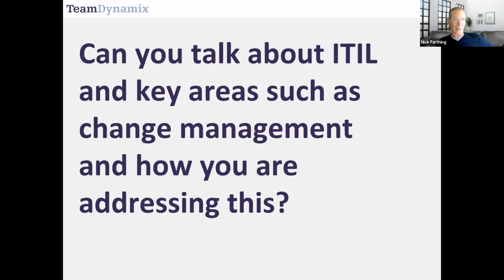And again, on those big holiday sales weekends, we're talking millions of dollars. So this really got a lot of attention. Within a week, we put an ITIL-based change management process in place using TeamDynamix as a platform. We've continually improved the process. It's totally woven into all the work streams of all the units within the department. And our outages caused by poorly planned changes have significantly reduced. They're almost non-existent. So it's had a huge impact for us, and we're really operating a lot better these days.